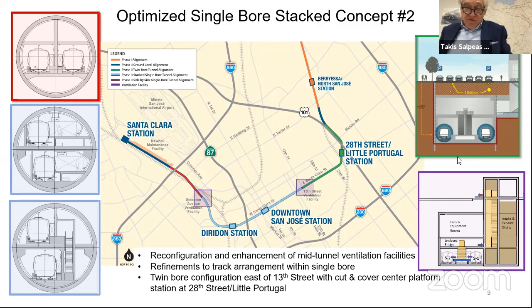You and I are on the same thinking here. That's the reason we have option 1 and option 2. For option 1, as you see, the 48-footer TBM is coming down from Berryessa, roughly speaking, and has the tracks side by side. That side-by-side configuration meets the BART criteria and optimizes BART concerns. And the other is the twin bores. The reason, I repeat myself, we put the twin bores is to have a comparative analysis, to respond to everybody who may say, did you look at the twin bores? Maybe they are cheaper, maybe more effective, maybe they go faster. We'd like to have them side by side.